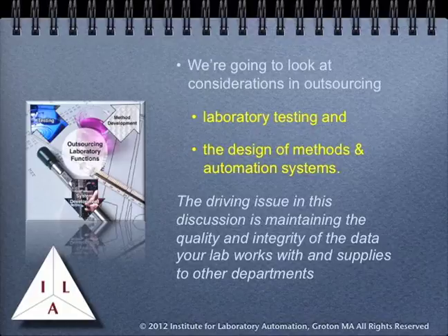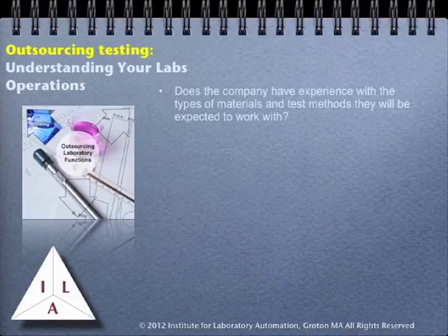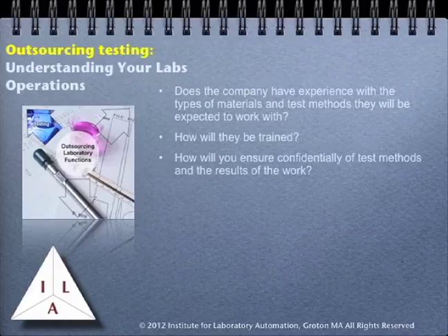We'll begin by looking at outsourcing of testing work. The basic problem we have to look at is that you are hiring an outside company to do work for you whose results are going to be passed on to other groups and reviewed as your work. Among the concerns that need to be looked at are those shown on the screen. Does the company have experience with the types of materials and test methods they'll be expected to work with? If not, how will they be trained? How will you ensure confidentiality of the test methods and the results of the work? Will they want to publicize the fact that they are doing work for you to build up their reputation?